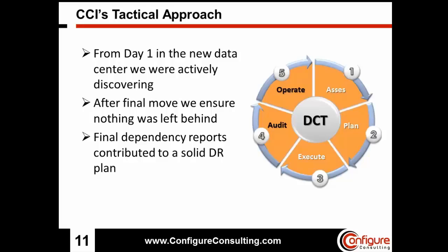And finally, the fifth step as part of our process is continuing to operate. So what lessons do we learn from performing the migration? That could be application to application dependencies that you weren't always aware of before. That can often happen in an organization where it depends a lot on tribal knowledge. If you have a large staff turnover, then some of that in-house knowledge just disappears. And with our discovery, we provide that visibility, and you can use that information moving forward. So this really helped out.